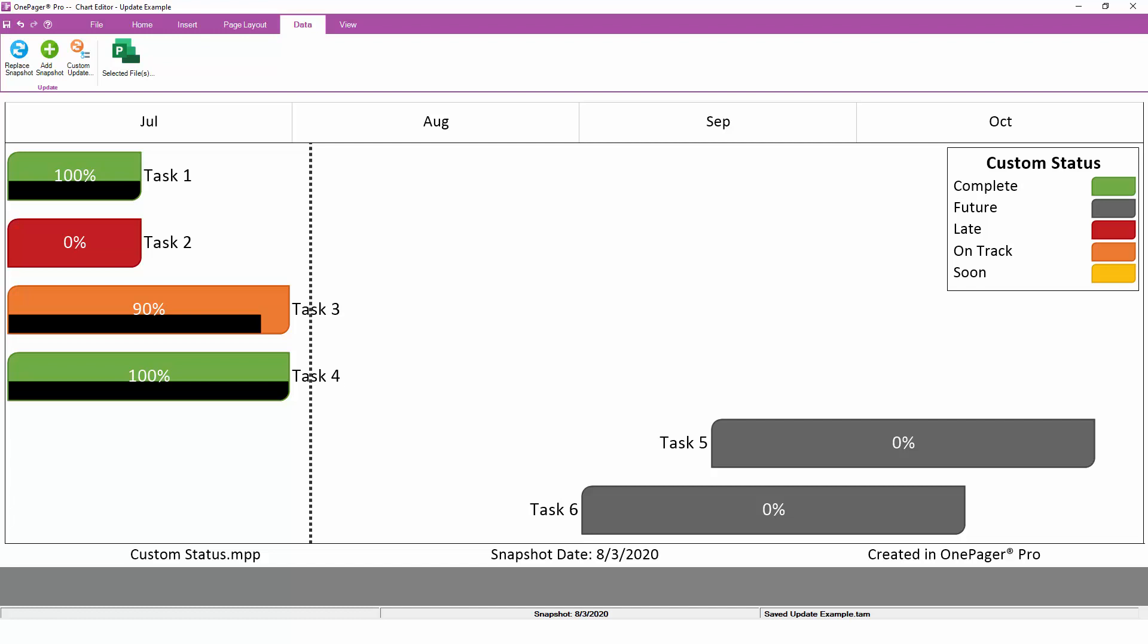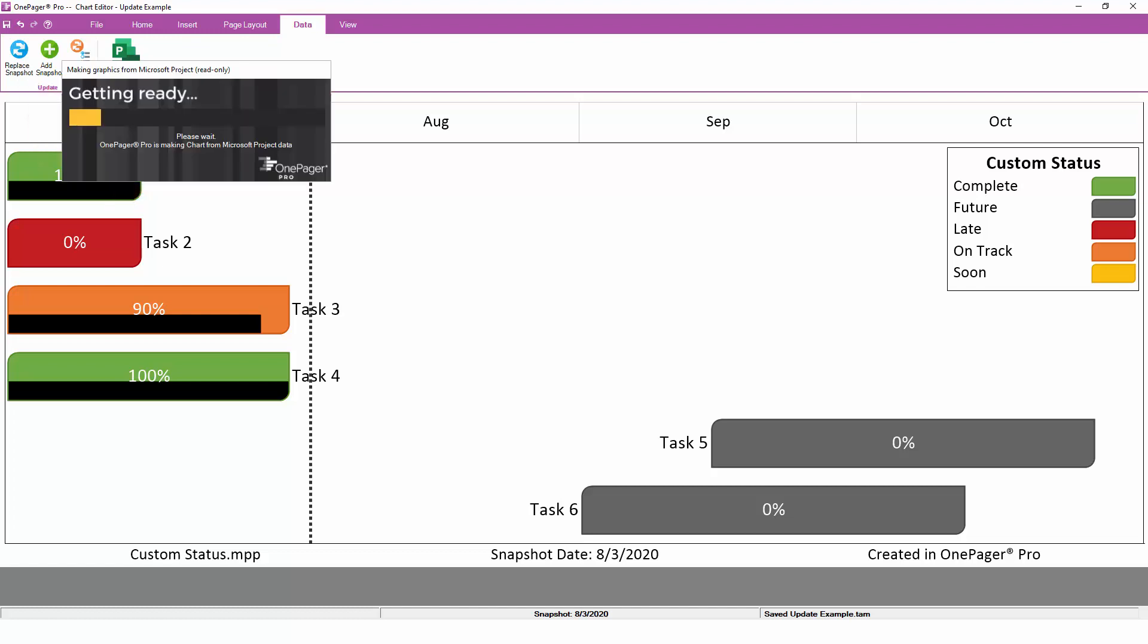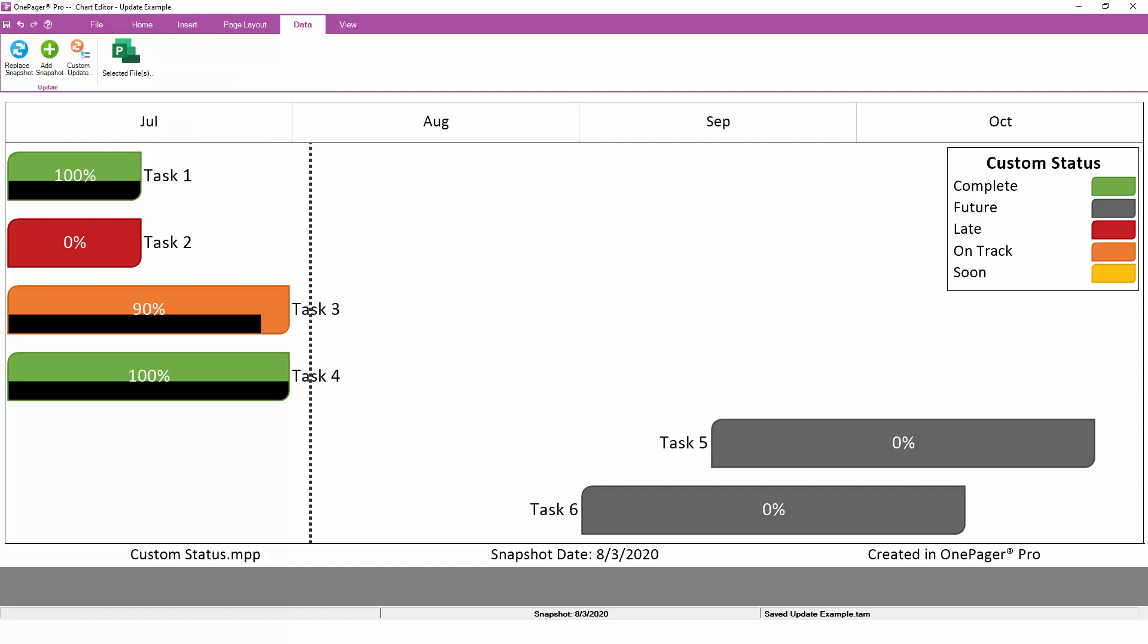If you want to do a quick refresh of your current snapshot as of the same date, clicking the Replace Snapshot button is how to do this. This will replace dates in progress, but not all properties.